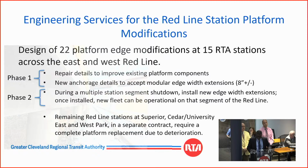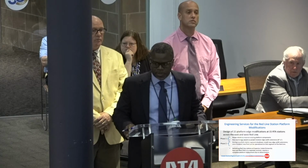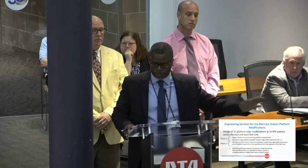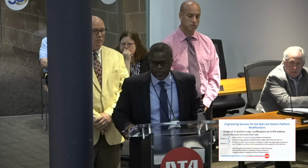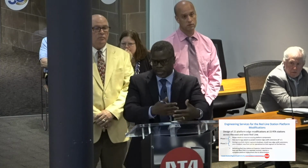Good morning, Chair Welsh and Ms. Terry and members of the board. I'm Fonseca, the Chief Operating Officer of the Greater Cleveland RTA. And so, Mr. Sleesman, when we decommission the system to bring up the new set of cars in the new system, we're going to shut down the east side first. That will allow the current heavy rail trains to operate from 55th all the way west while we have east of 55th shut down. In order to get the old cars off of the system, we have to take them to Brook Park. So when Kirk is explaining, we have to at some point take the last train west, and then we're going to close the line in, meaning we're going to put the extensions there.